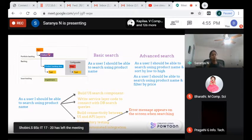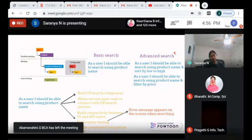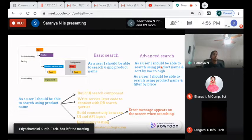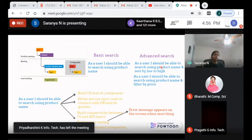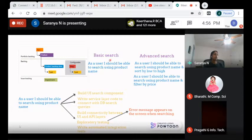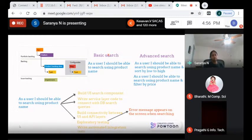The next level down is features. We break the search epic into different features. On Amazon, when you search for a product, there's basic search and advanced search. Basic search lets you search by product name; advanced search lets you search by product name and filter by price — low to high. We break that into two different features.